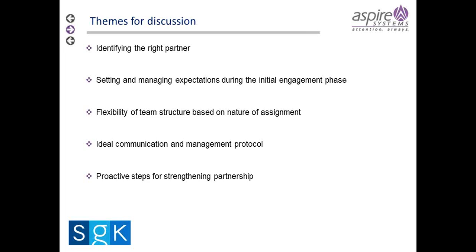So we've got more onshore presence on that, probably more like 30% onshore, 70% offshore. As that project matures and the requirements get defined, we're going to see that shift during the life cycle of that one project.